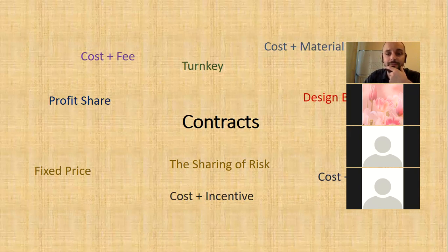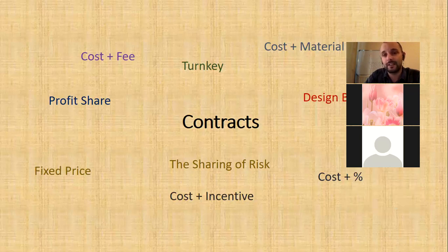A cost plus fee, sir. Why? Because you cannot supervise. So maybe the one that's doing the job, I mean the bidder, maybe he will make the cost of the project very large, so that his percentage will be much more, and he will maximize his profit. Exactly. Yeah. So he has no incentive to keep costs down. In fact, he has an incentive to raise the costs up.